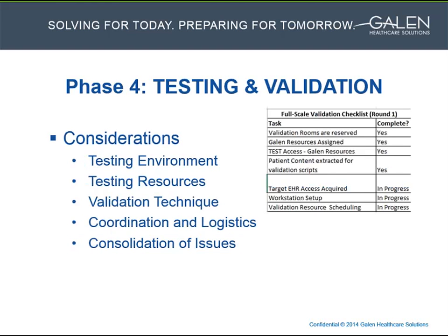One thing that can be discussed early on in the project is the testing environment. There will need to be a review around the client's current testing environment configuration. The main concern is to make sure that the testing environment you are using for the conversion closely reflects the production environment. If the testing environment is out of sync with production, then the test data could potentially not reflect what the data will look like when converted to production. We usually recommend that the testing environment be refreshed to reflect a recent copy of production early on in the project.